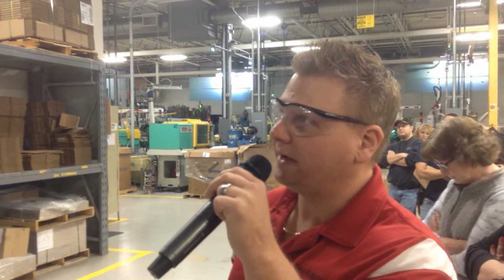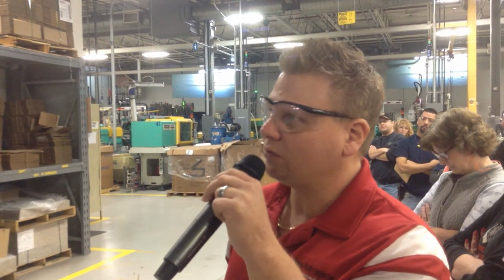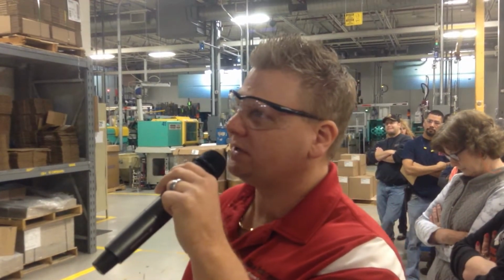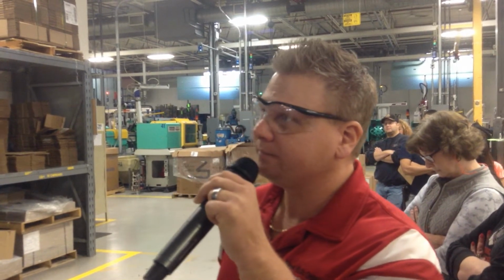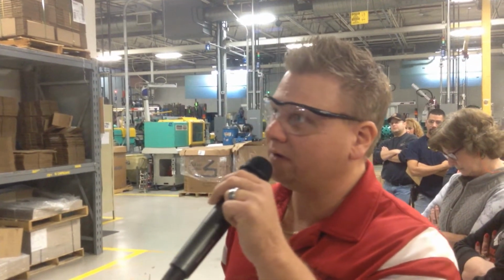On Fridays, I provide a weekly report to all the bucket leaders. And what this does is it quickly gives us an overview of pursuing to completion, our accomplishments, our critical path items and what we need to concentrate on. Any upcoming meetings that might be listed that I know of are listed in the report.